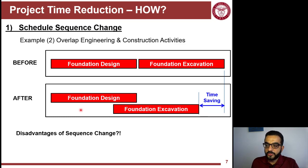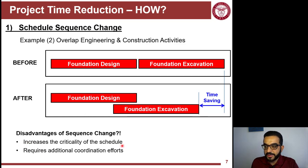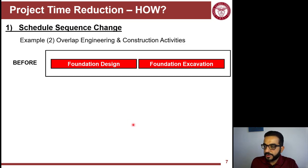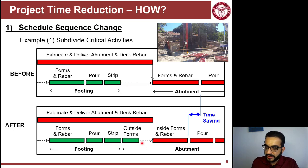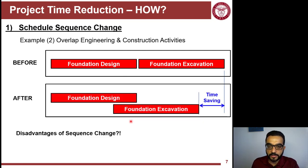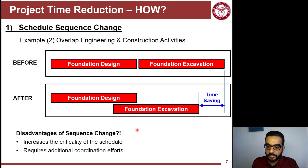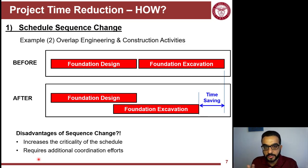One possible drawback is that it increases the criticality of the project. Those activities had more float before acceleration, but now they have reduced float. Reducing float translates into increasing criticality — a one-day delay becomes a much bigger deal proportionally. You increase criticality by doing things in parallel. Another drawback is it requires additional coordination because you need to stay on top of parallel activities, which overloads your management team.